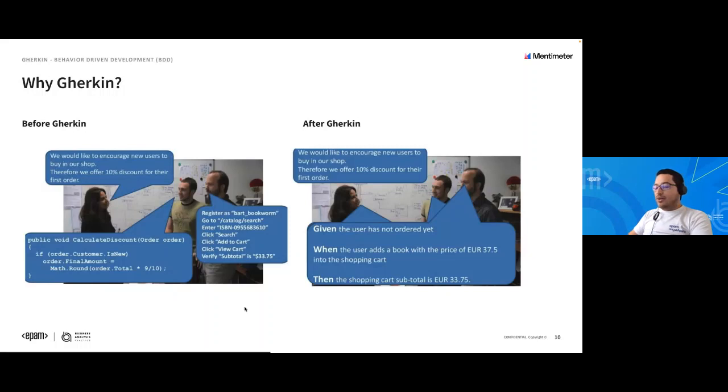So if you are not a developer, or if you didn't have experience as a developer, you are going to understand nothing. So to resolve those situations that you have been facing, with Gherkin your team is going to start thinking about the scenarios that are going to happen, what are the preconditions that need to be fulfilled, what are the actions that are going to trigger anything that you need, and what would be the expected output. So with Gherkin, you are going to reach a different way to understand what is happening with your users, their interactions, and the flows that they need to go through.